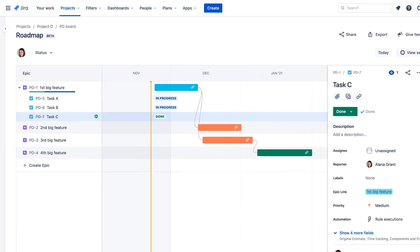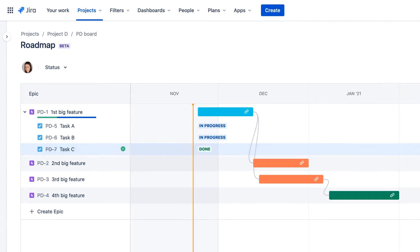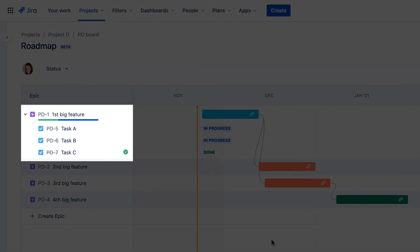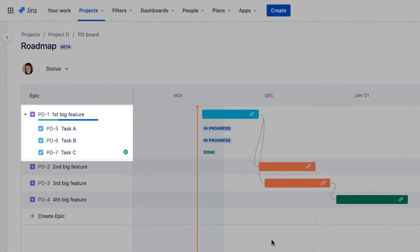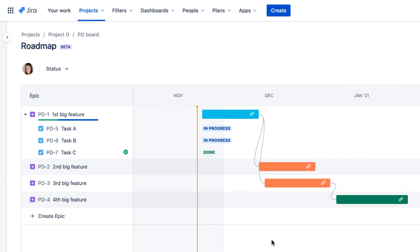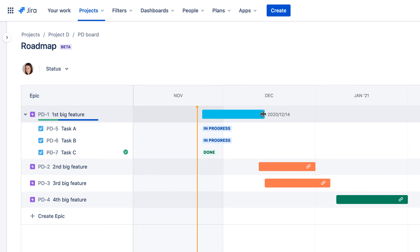Note how the progress bar below the epic provides a general overview of the epic's progress based on the status of the related issues. As work progresses, the roadmap automatically reflects ongoing progress as well as provides warnings if the project is at risk. Note how the dependency link turns red when delays in the first epic block the activity in the second epic.